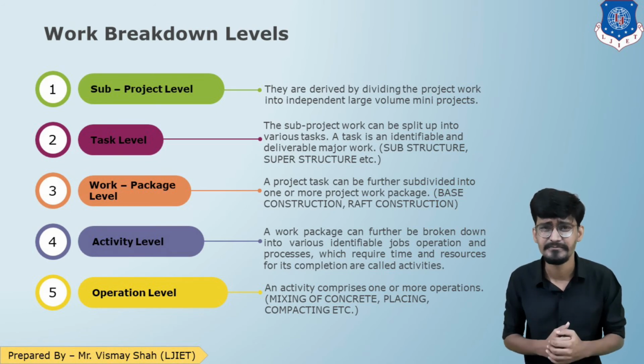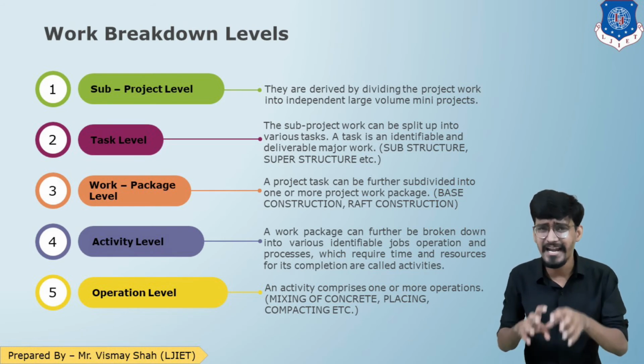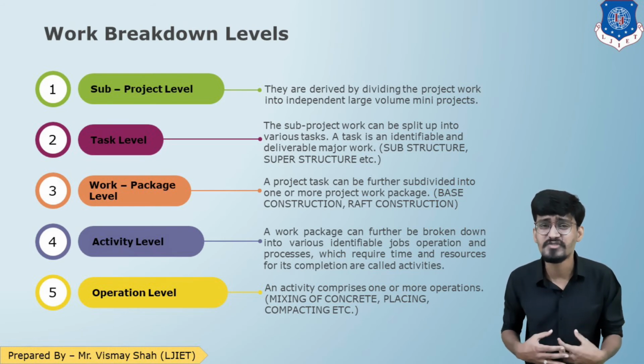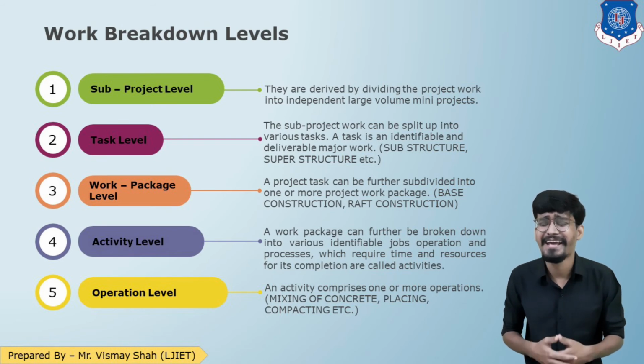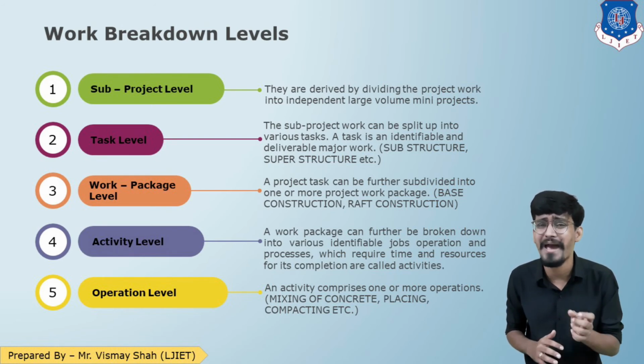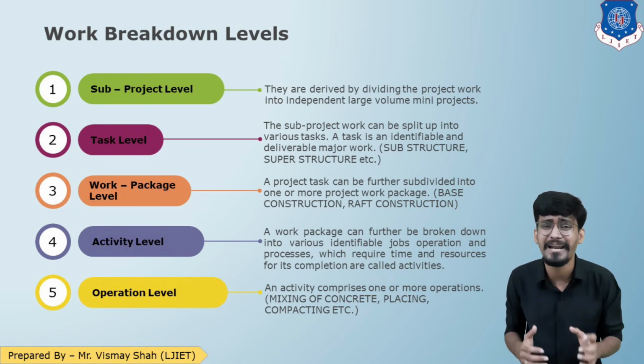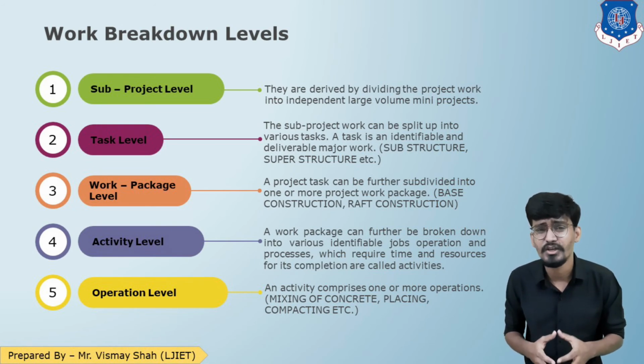The next is work package level. When the task is divided further, it becomes the work package level, such as base construction, raft construction, etc. So that is your work package level. The next is activity level. Now a work package is further divided into manageable jobs which require time and resource to complete the work. That is your activity level.